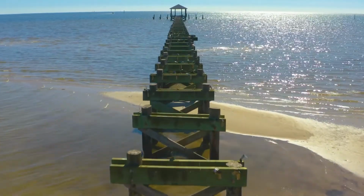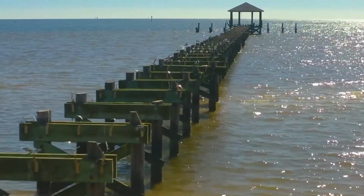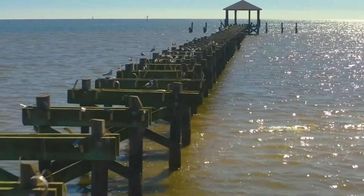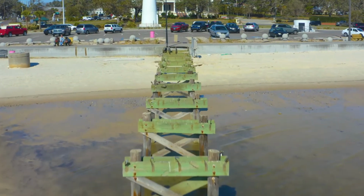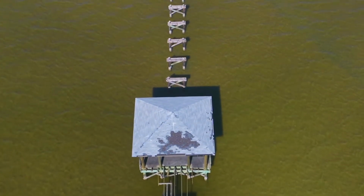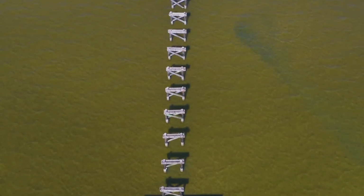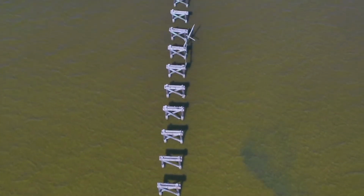The center is open daily from 8 a.m. to 5 p.m. Just south of the Visitor Center, work on the Lighthouse Pier continues to progress. Mayor Gillich has said many times that the pier will be built back stronger than before. The design of the pier has been completed and has been submitted to FEMA for approval. The new pier is expected to be built with concrete pilings and flow-through decking with a protective rock jetty. No timeline is set for the approval or for the work, but please know that the city is working to get the pier rebuilt and reopened to the public as soon as possible.